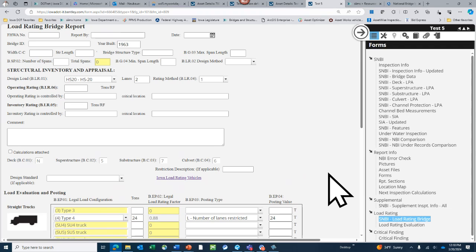And the push to have it now is because some of these will be on 48 months, or you may have some on 48 months that are going to be coming due. And we did not want you to miss those ones that may not pop up again until like 2029. Yeah. And then we would be dinged for not catching those in advance.